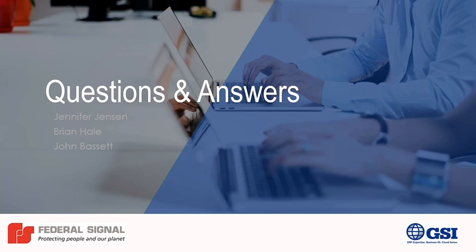Yeah, good question. So phase one was the lift and shift from our provider to Oracle Cloud. We moved everything over there. And we probably didn't tell you this, but we have a FastConnect into the Oracle Cloud. And so that's part of our MPLS. So there wasn't any latency there. So we lifted and shifted our 4.2 version of DSI. It's really, really old. But we didn't want any risk on that. So when we went to phase 2, we went to 8.5, and we upgraded it then. So no issues.